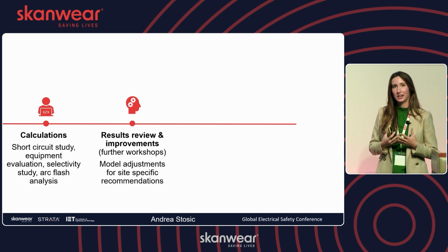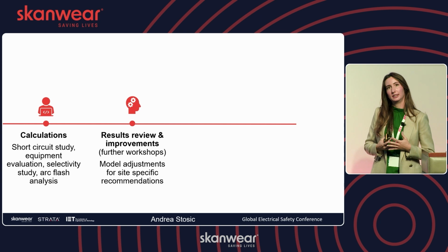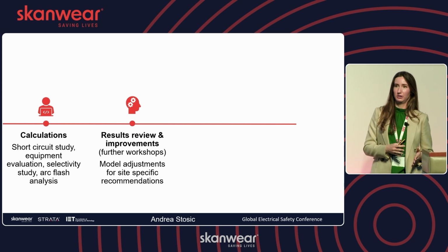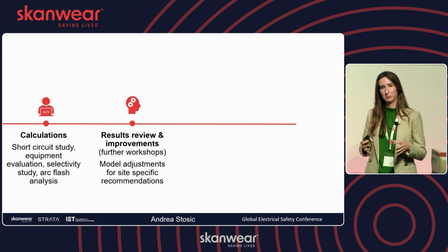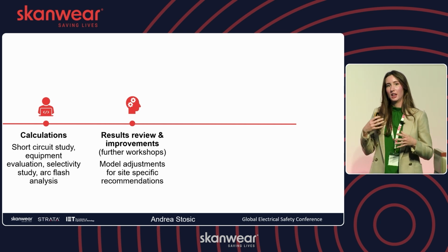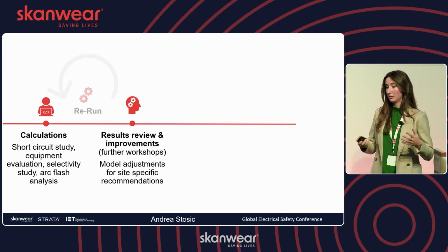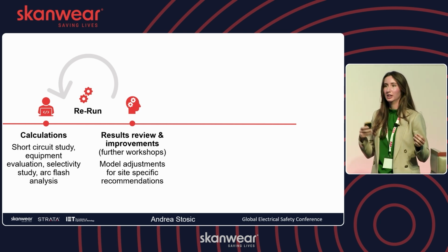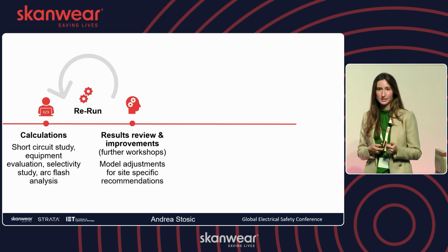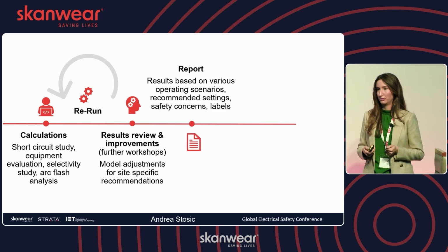There's usually a bit of a trade-off between selectivity and achieving low incident energy levels, so it is important that everyone comes to the table and that everyone understands the final result. This step may take a few iterations. The consultants may go back, recalculate, do something else, and then once everyone is on the same page, they will go ahead and produce the final report.